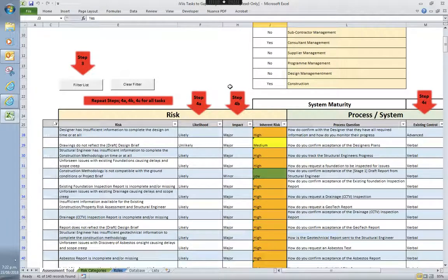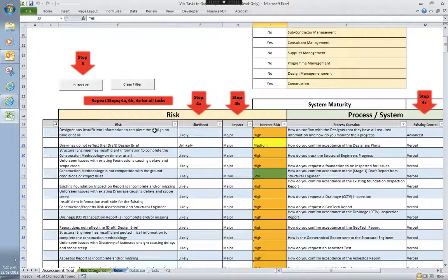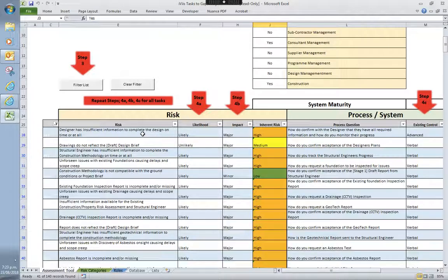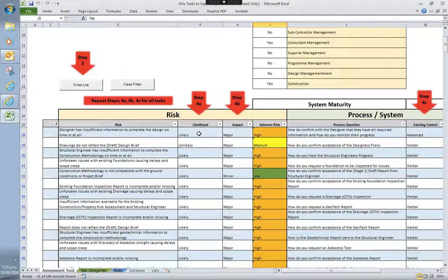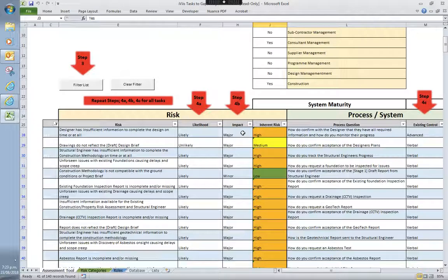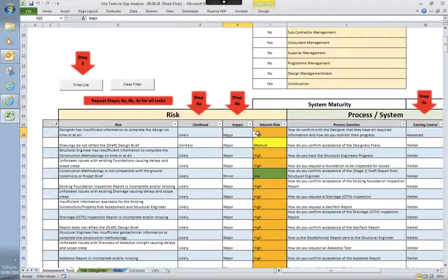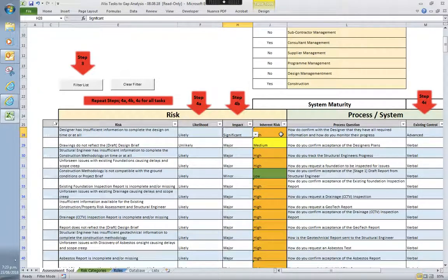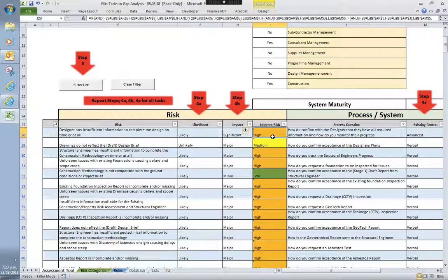So the next step for you is you'd go through and look at each of these tasks from a risk assessment and then a process and systems assessment. So from a risk-based approach, you'd look at what is the risk that the designer has insufficient information to complete the design on time or at all. So that's where you as a project lead will look at the likelihood of that situation happening and then the impact that would have on the project. So let's just change that down to, let's say, a significant. What that does then is it uses the usual inherent risk matrix and will select it as high.